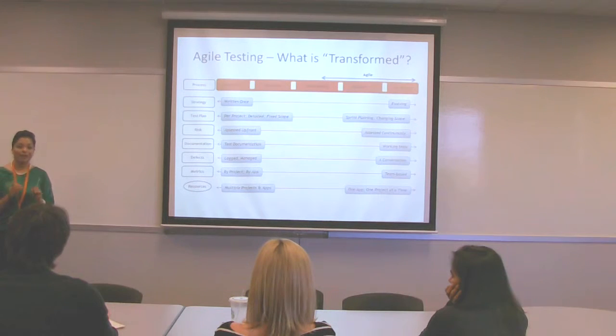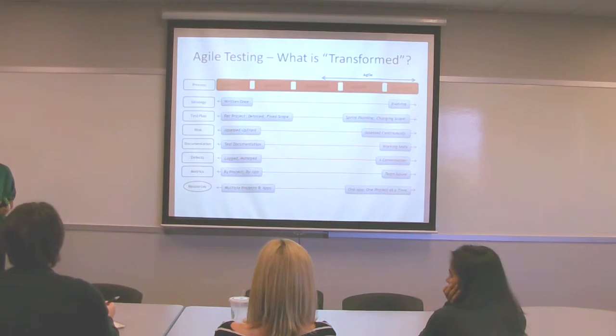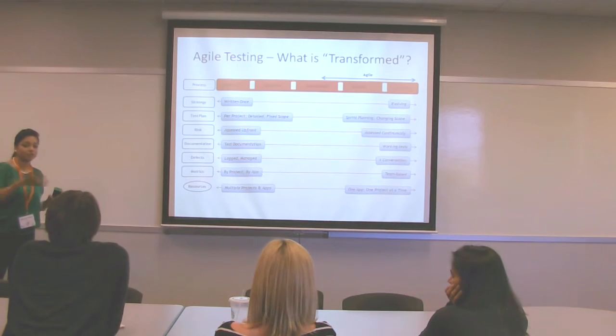Or, to clarify it a little bit more, is writing one story for only that app. A story should not be written for two apps at the same time. Let's say if you have to make a logo change and you have 5 applications. Try and create 5 stories.